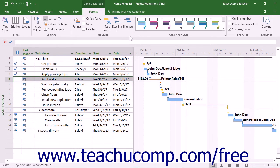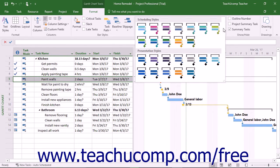You can also apply a preset Gantt Chart Style by clicking on a style shown in the Gantt Chart Style button group. If you click the More button in the lower right corner of the scroll bar within the button group, you will see all the Gantt Chart Styles shown in two categories: Scheduling Styles and Presentation Styles. Scheduling Styles differentiate the color between manually scheduled and auto-scheduled tasks, while Presentation Styles show all tasks in the same color regardless of the scheduling method.